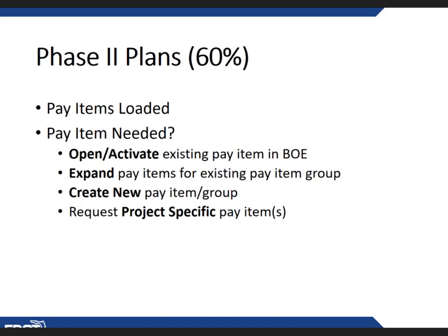However, during phase 2, it's important to realize that requesting some pay items may take different reviews, like technical or legal, or you may need a technical special provision. Now, let me say that just because legal has approved the tech spec or whatever is submitted, that doesn't necessarily mean that it has technical approval. So we've got to keep that in mind. We walk that line. We have to be legal about it, but we also have to make sure that it's structurally sound and based on good engineering decisions.